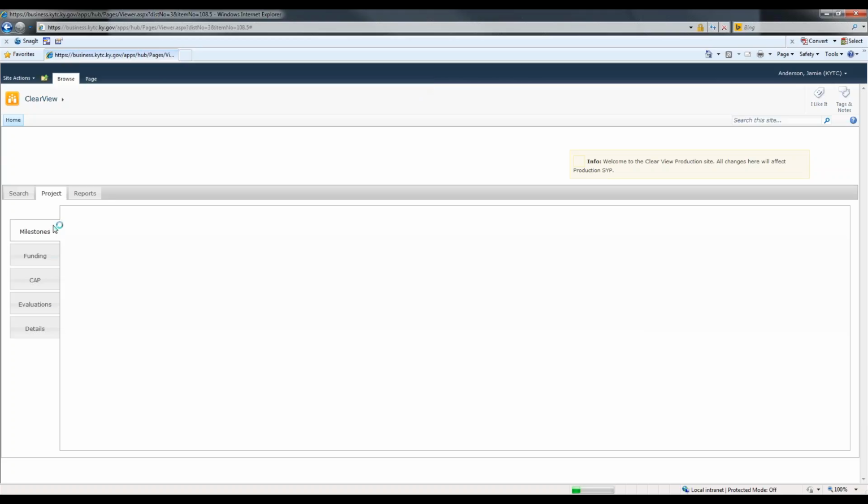We have 13 milestones. When design funds are authorized, this is where you set what milestones are required or not required for the project. When the project is created in SYP, the default value for each milestone is unknown. To view the list of milestones and populate on the report, each milestone needs to be initially set to required or not required. This helps the different subject matter experts know if they should be tracking this project.